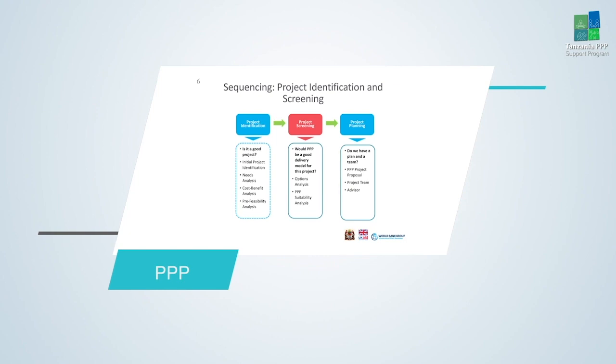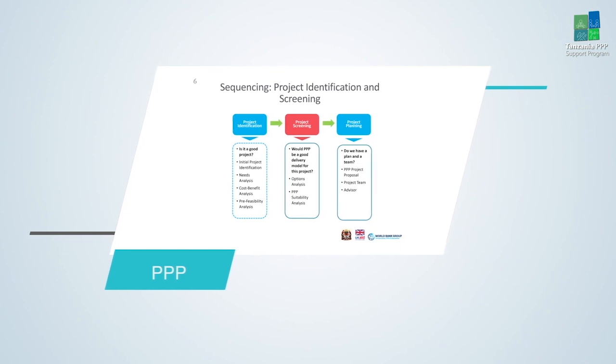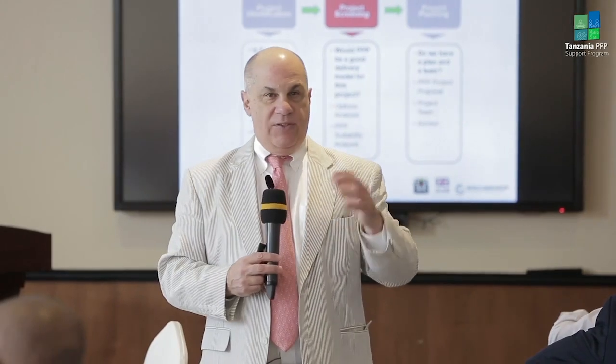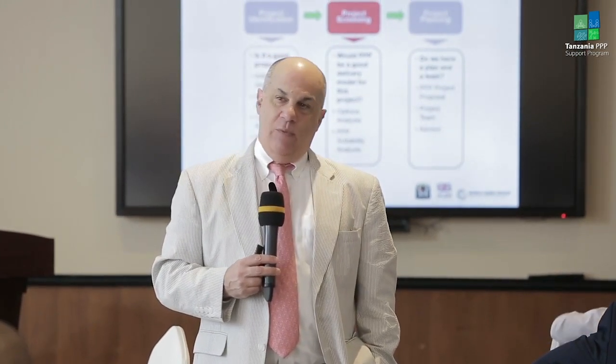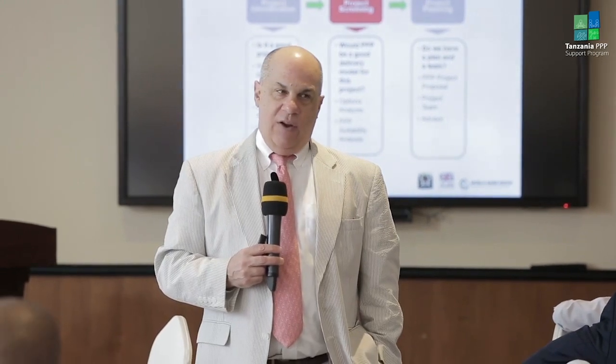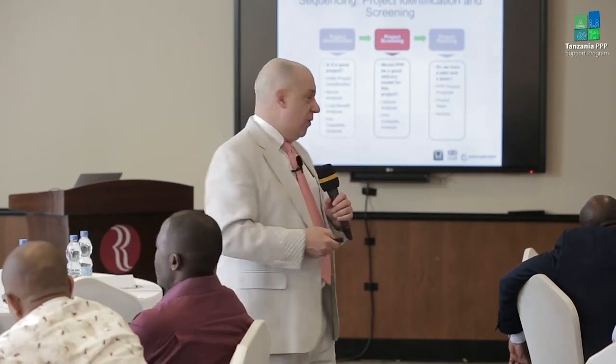By the way, if I'm the Minister of Finance and I ask you to look at a project and identify, well, we've identified it, but I want you to screen it, how long do you think that might take in terms of months? Does it take a year? Can you do the work in a month? 6 months? It takes a relatively short time. You should be able to do this in maybe sometimes 2 months, 4 months, probably no more than 6.